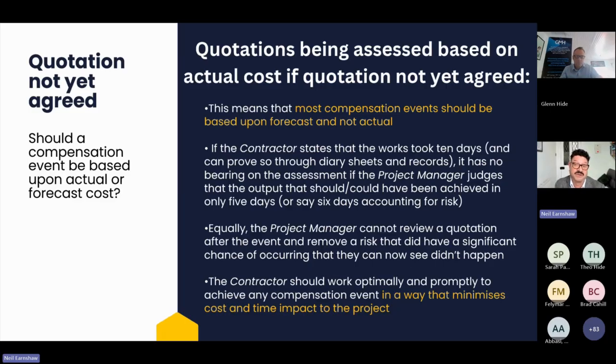And actually, I know we're going on to talk about mutual trust and cooperation in a second, but basically the judge highlighted that as being the antithesis of mutual trust and cooperation, the refusal to hand over records. Which is interesting, because you can see how the consultant was conflicted. If I give them the records, I know what they're going to do with them. Yeah. So, interesting case. But remember, it turned on the facts of both parties being in breach of contract, and that's what led them to the dispute in the first place.